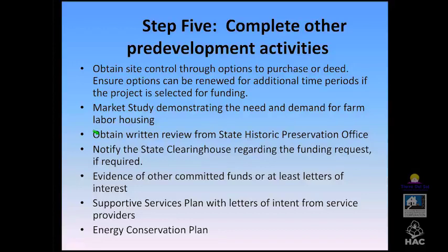And we are finding in several states that they are saying, oh, this site has never had a review, so now it needs something called a cultural review. And that's where someone is hired by you that's approved by the State Historic Preservation Office, and they go out and they review the site, they provide a write-up, and they give guidance to the SHPO office if it is okay for clearance. It's going to cost you several $1,000s, and it's going to take about 60, 90 days.